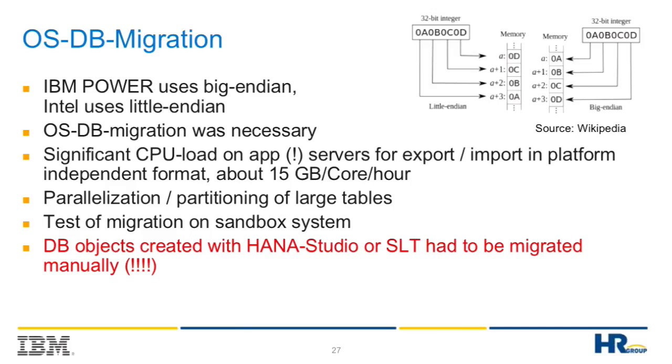We involved SAP because we couldn't find why this data was not exported, since the export log files showed it was successful. We got support from SAP, and the workaround was to export this data directly from the database and import it.